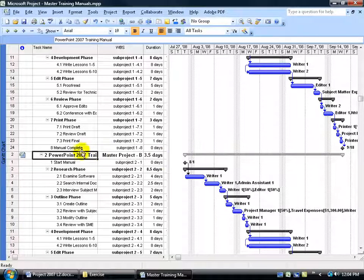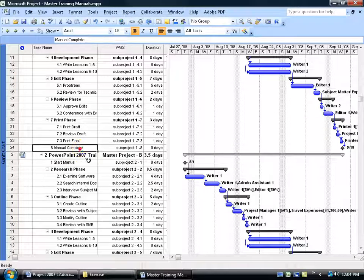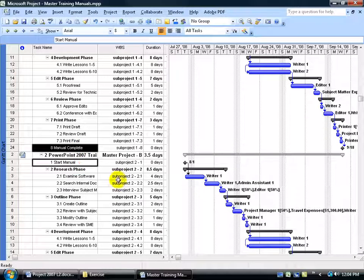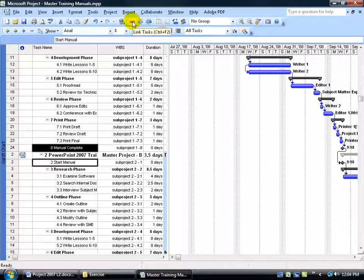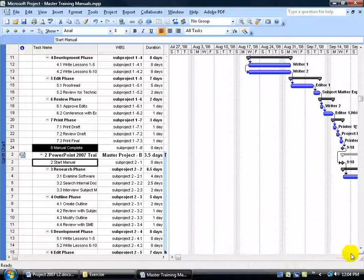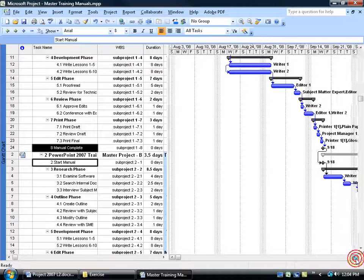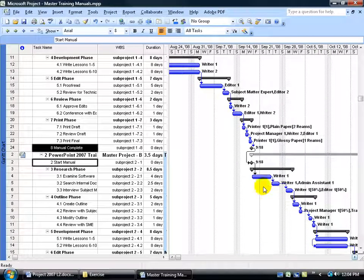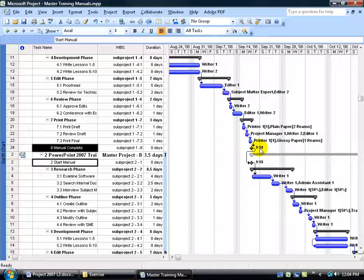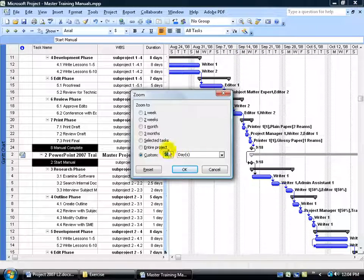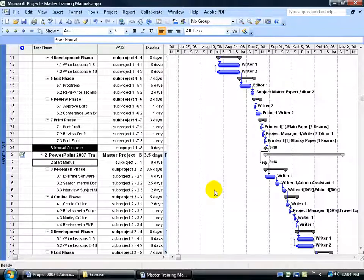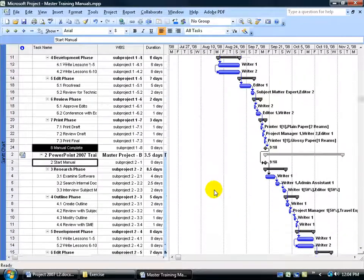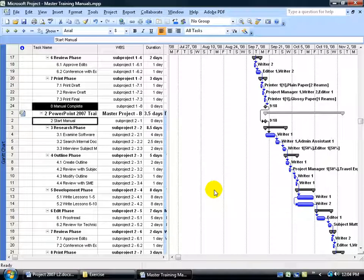So what I'm going to do is select the last task in the first project, hold down the control key and select the first task in the second project, and go ahead and link them together. Now look at this. Instead of starting at the same time, which was August the 1st, it now picks up where the first project left off, which was September the 18th, supposedly when that gets finished. Of course I can come up here, right click to zoom and save the entire project and click OK. And it tries to scrunch it in there as best it can.